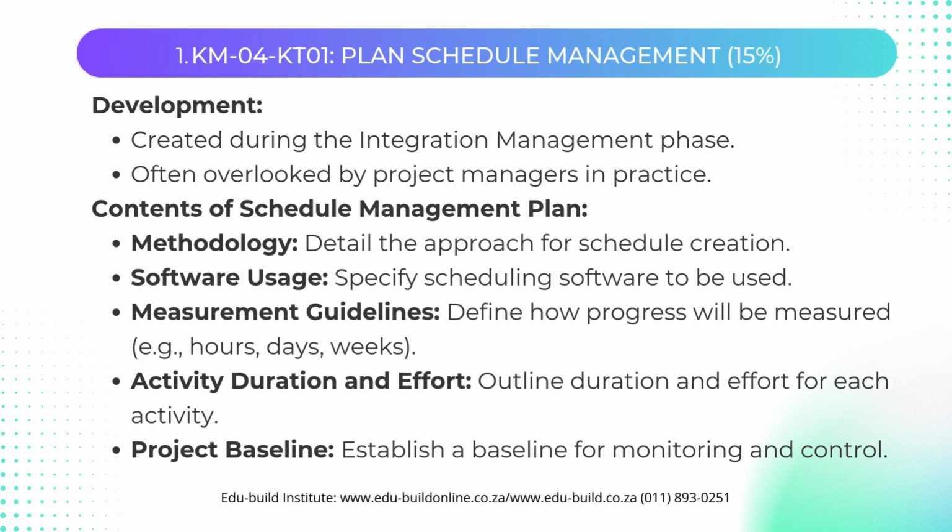Define how project processes and progress will be measured. Will it be in hours or days or weeks? This obviously depends on the kind of project that you are doing, and so the larger the project, the larger the time frame in which you will measure is the rule usually, but it is not always the case. It also depends on the complexity of the project. If it is something that is highly complex, you have to break it down into bite sizes and measure using smaller increments.